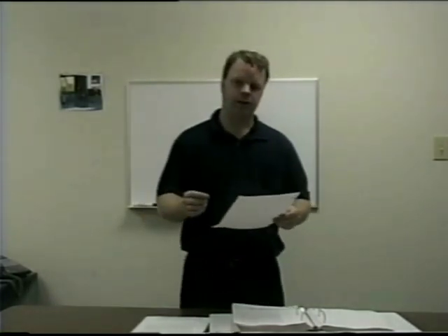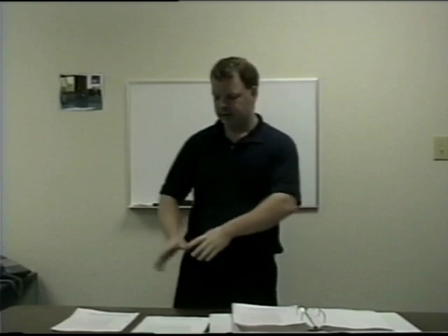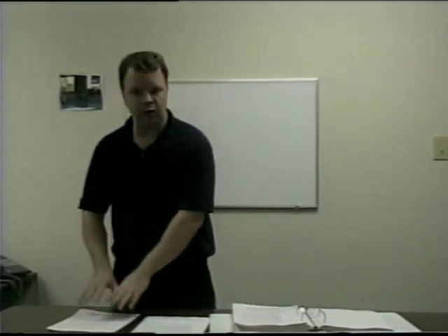When you get done with the job inspection, you file it in the empty 3-ring binder. This one is the one that's going to stay with the project file. After the project is done, all the files are boxed up, put in a storage room at the company's office, and these inspection reports are going to be put in there with it.